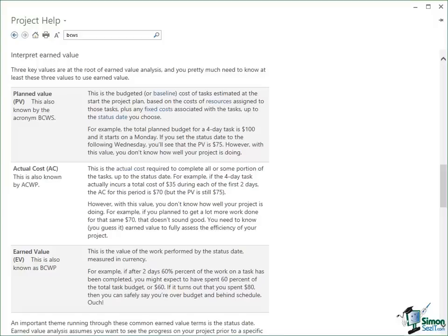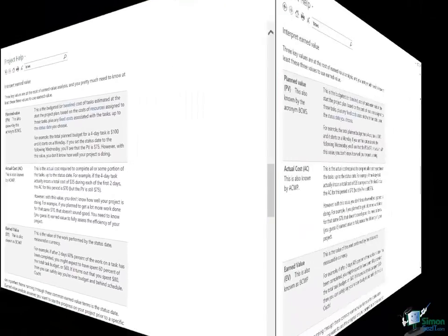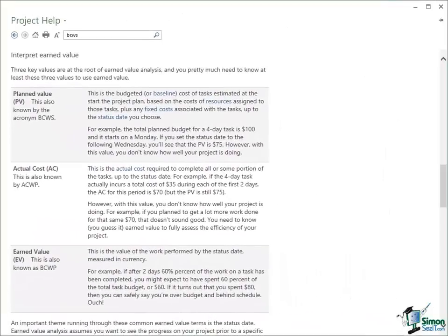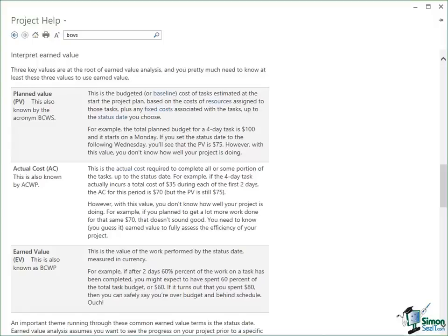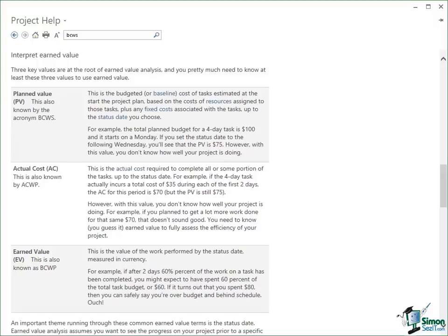The final piece, the important piece, is the third value that we're going to look at next which is the earned value. In fact earned value is itself a relatively straightforward thing to understand particularly if you look at the longer acronym BCWP, the budgeted cost of the work performed. Let's suppose that I get to the end of day two of this four day task and I look at how much of the task I've done. I should have done 50% but let's suppose that I look at the task and I say I've actually done 60% of the work then the earned value is basically $60. I've done 60% of the work so the value of what I've done is $60.